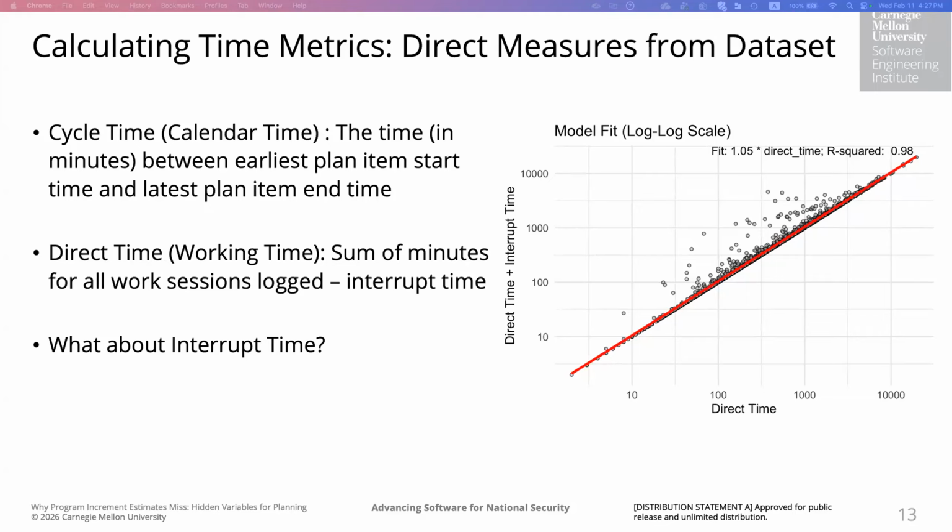So now we can also see that for very small work items around here, which is under an hour maybe, and for very large items around here, which is roughly greater than 20 days, it shows relatively small proportional deviation, and the deviation disproportionately affects the medium-sized tasks.